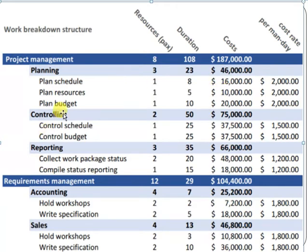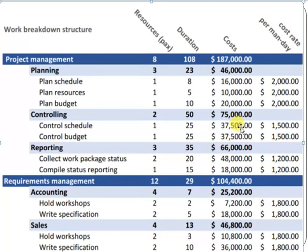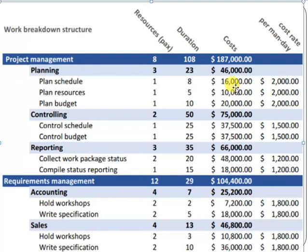Similarly for controlling, the days are 25, 25, and 50, and for reporting 20 plus 15 equals 35 days. For the controlling schedule and control budget you need $37,000 and it becomes $75,000 total. For reporting you need $48,000 and $18,000, which becomes $66,000.